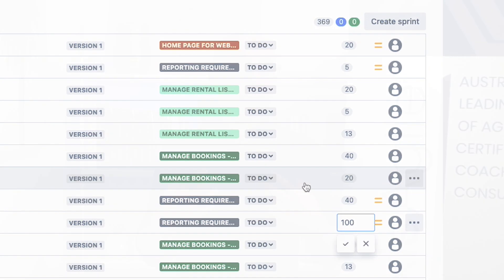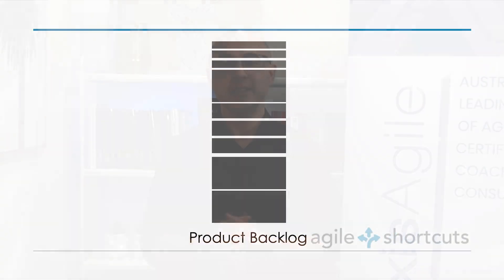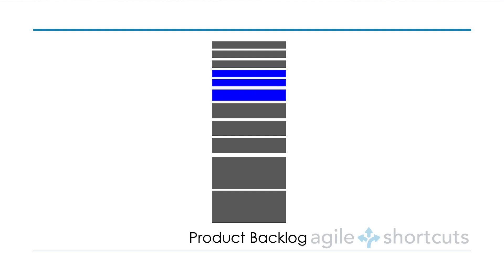I suggest using an approach called relative estimation — you might be more familiar with the term story points or velocity. If you're unsure how that all works, I do have a series on relative estimation on YouTube and I'll put a link to it in the description below. Once your team has identified the product backlog items that are too large, it's time to split them down into smaller product backlog items.